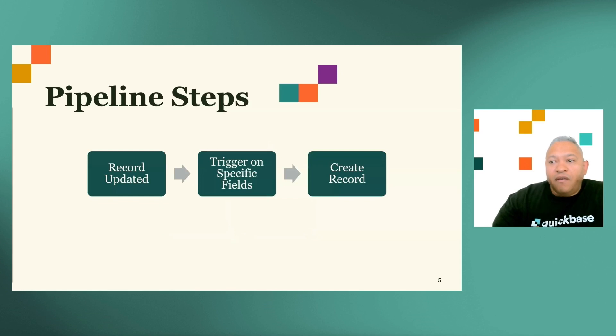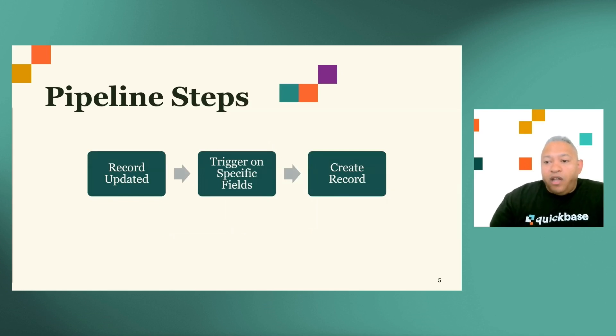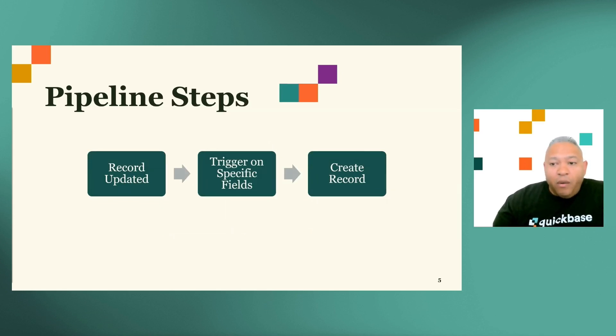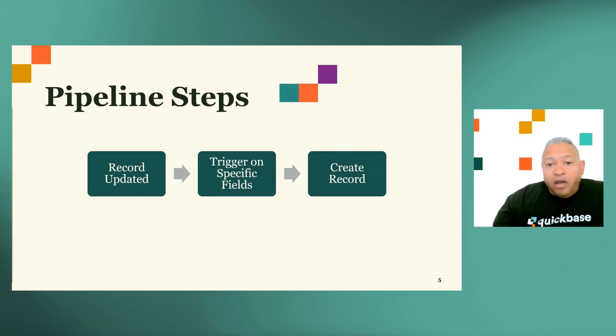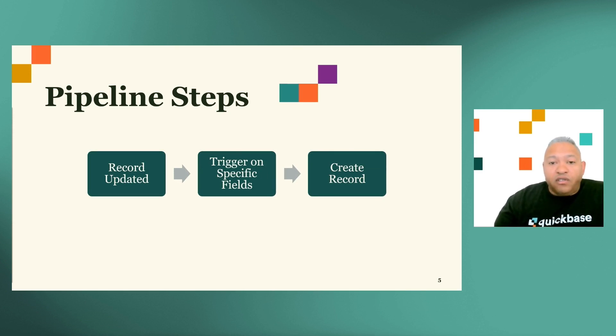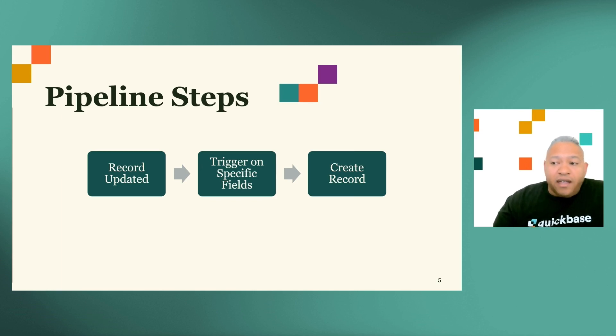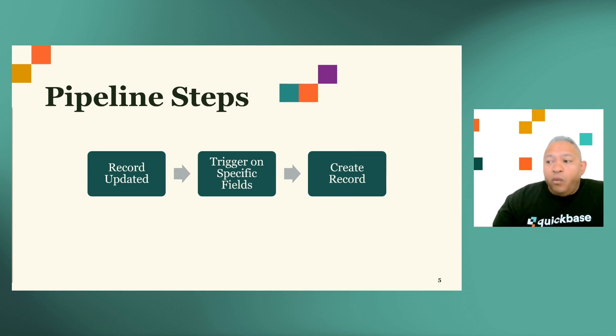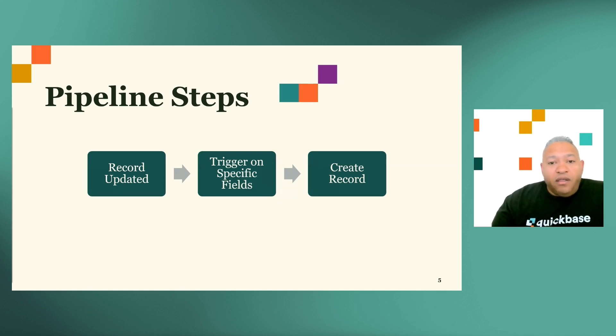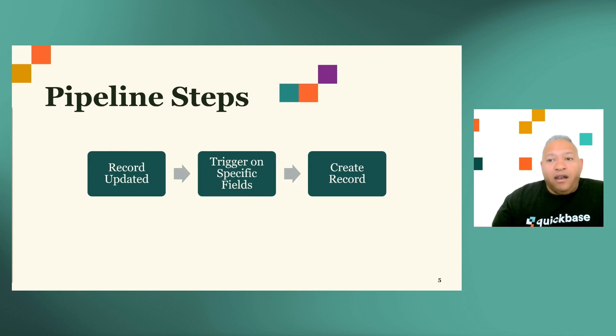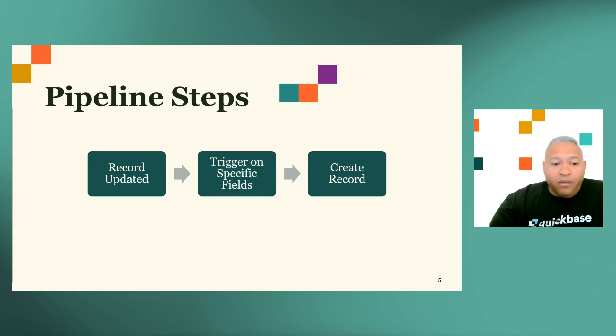For the pipeline steps, we're going to trigger on a record updated. However, we're not going to trigger on every single change. We're going to be triggering on specific fields that are the fields that we're interested in tracking. Once that trigger is set, we're going to create a record, leveraging the previous values that we'll see in a minute, how to leverage that inside of Pipelines.